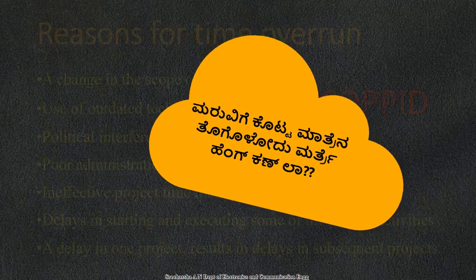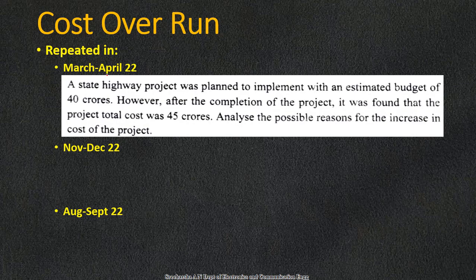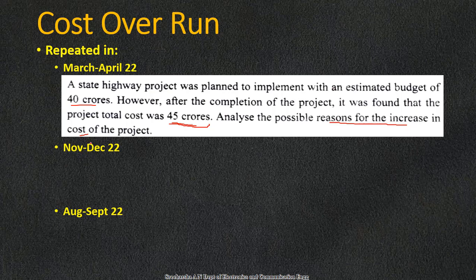The next most repeated question along with time overrun is cost overrun, also repeated in these three question papers. In March/April 2022: 'A state highway project was planned with an estimated budget of 40 crores. However, after completion, the total project cost was 45 crores. Analyze the possible reasons for the increase in cost.' Cost overrun is simply an increase in project cost, just as time overrun is an increase in time duration beyond what was planned.